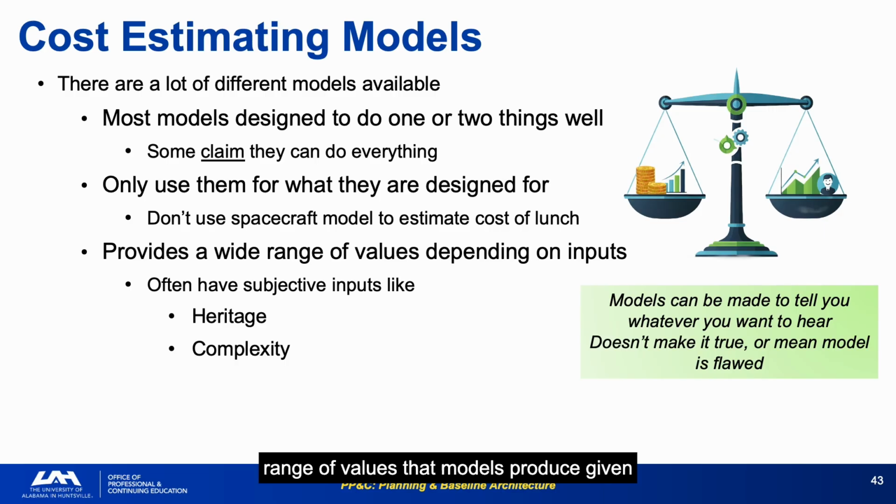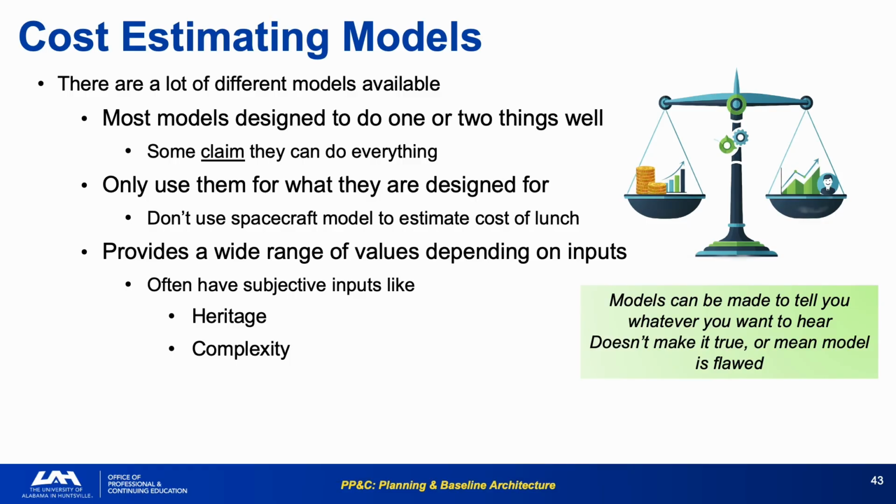The range of values that models produce given different inputs is the uncertainty band, and that band should directly inform your UFE, management reserve, sizing. If the model produces a wide range, your reserves should reflect that uncertainty. Subjective inputs like heritage and complexity are the analyst's responsibility to challenge. They're the levers most easily adjusted to produce a desired answer, and their settings should be documented and defensible.